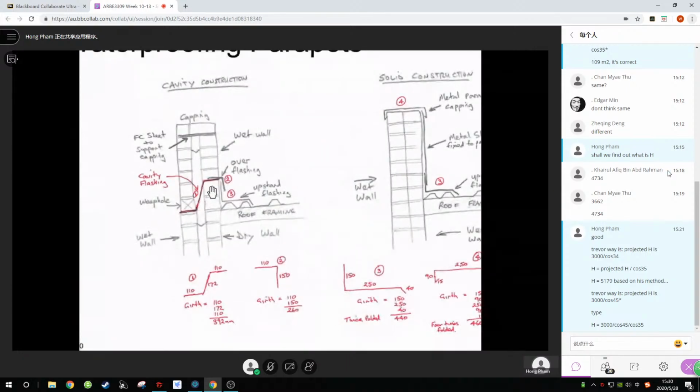So the number of times it bends is what it means here. For example, this one, number 1 is here, and you have 2 here, so you have 2 bends. You state the total width, 392. 392 is more than 250 and less than 500, and 2 times bent. This is how you describe the flashings based on the standard. Okay, so let's have a little break here.